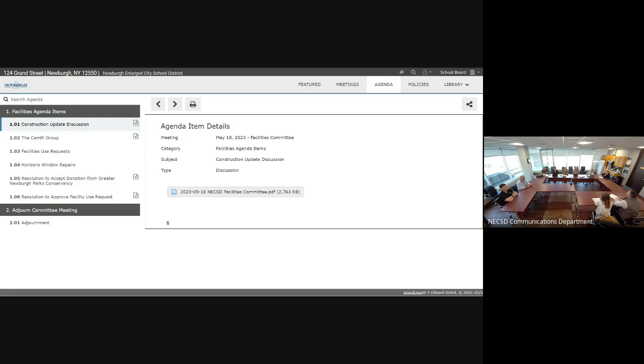We'll do the demo of those units. Unfortunately, I think the units themselves, the air handler units, ship out. They'll be here, I think, the third week of the summer. So we talked about that. August 1st, I believe, was the date that Andy and I spoke that he can get in there and do his work.